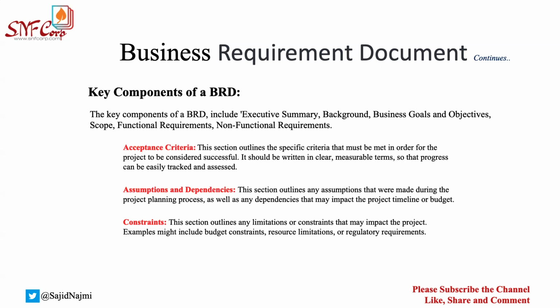You will also write, if the data is not being provided, this might impact the project delivery timeline. So those dependencies you will have to write very clearly. Let's see if you do not write. Business is not agreeing on that. Business has not given you the sign off. And during the UAT, even though you're right, you don't have the data from the business to test, you could not complete the testing. Business is not going to accept that excuse. Business will say, you promised to deliver at this time and you are late. There could be some penalties as well based on the contract your company has signed. So in order for you to avoid those situations, you will make sure you're writing all those dependencies as well.